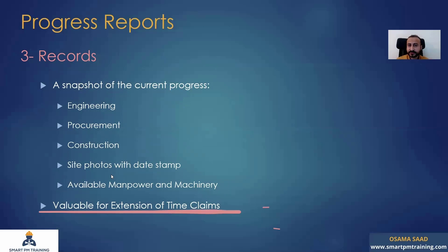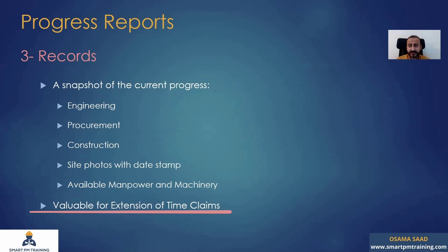But the snapshot is very important for extension of time claims, for example. After one year from the project start, you have a specific progress status, and many parties contributed to the current progress status. The contractor was in delay for some activities, the consultant delayed the approval for some activities, the client delayed the nomination — there are many things going on. It is important to record what is going on on a weekly basis, and a snapshot of everything that happened over time. Maybe you are doing paint work right now, but you should have completed all paint work, which means you are in delay. A snapshot will help you identify the parties responsible for the delay.